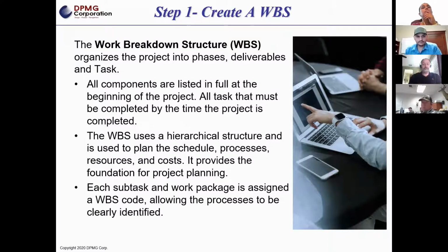So, definitions of what a work breakdown structure is. Basically, a work breakdown structure is a family tree, right? If you look at it from a pictorial perspective, it's a family tree. It should have all the components listed for the entire project. When we talk about components, we're talking about all the work that needs to be performed. The intent is to start at a high level, and at every level that we go through, we break that work down into further details. And we'll talk about what is a reasonable level to break it down to.